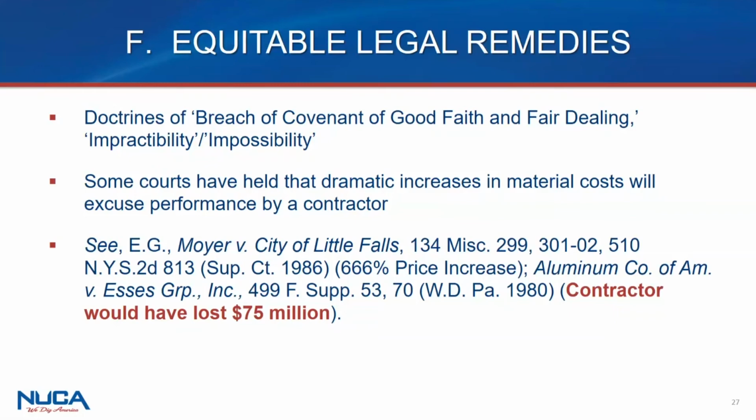I had an example out of one DOT, the spec that says, I quote, the department will pay the contractor for increased material costs or material shortage costs due to owner caused delay. I noted when I was looking at the memo that was circulated just last month by the Texas DOT, they recognize that if they cause a delay, they should have to pay for it, even if it's not expressly provided in their specs.